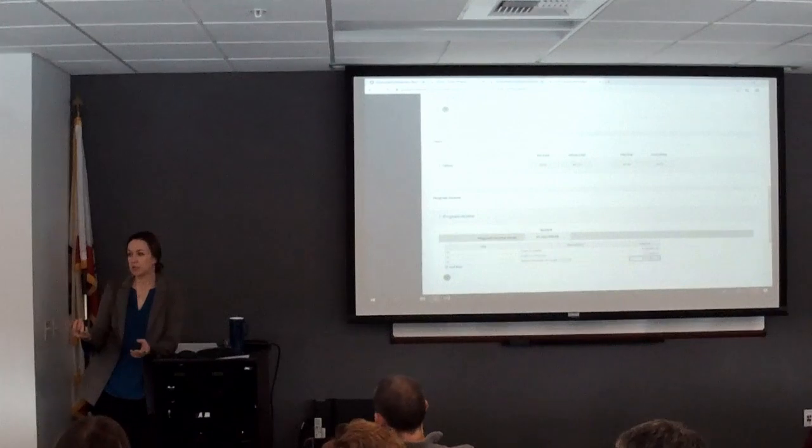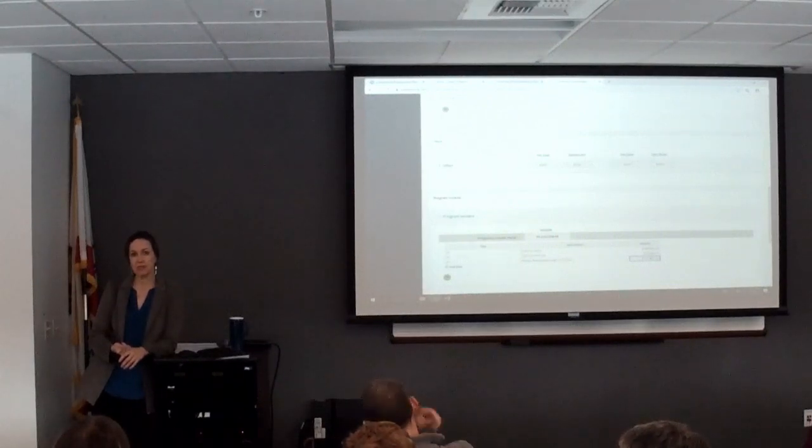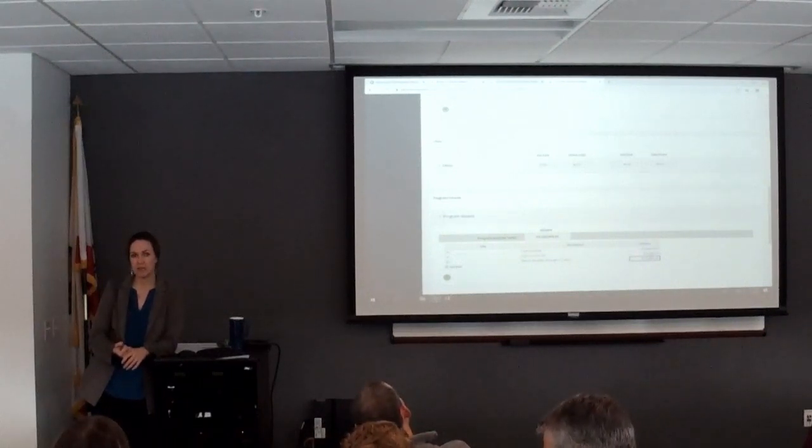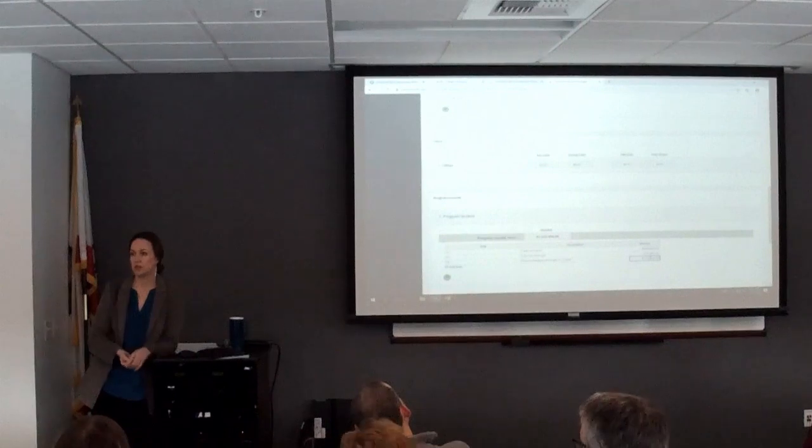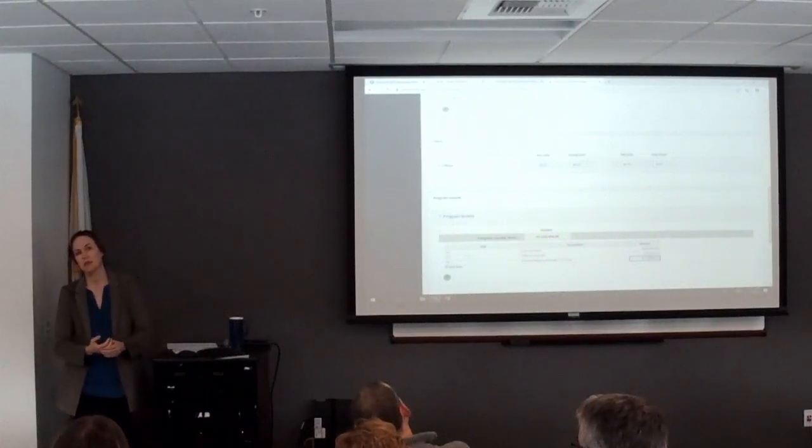So, if we're doing a community center and we want to add benches and picnic tables and gazebos, well, that's not in the initial budget. But if we get program income, now we have the function to add picnic tables, benches, and gazebos. So it's a matter of looking at your project, saying, what is my baseline, what's my base project cost? And then having a mechanism by which you can actually add bells and whistles to your project. You want to add solar panels? Fantastic. This is a good way to pay for solar panels.